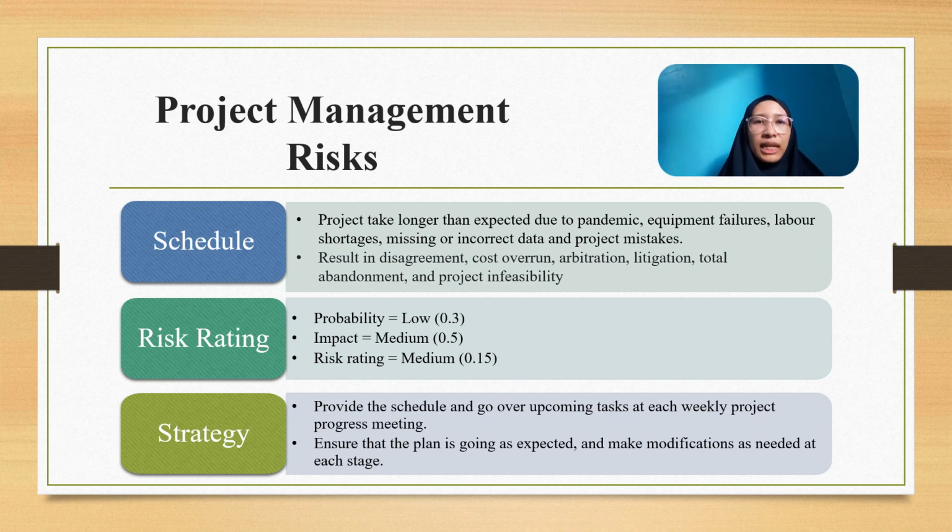The probability is low, impact is medium, and the risk rating is medium. By providing the schedule, going over upcoming tasks at each weekly project progress meeting, and ensuring the plan is going as expected and making modifications as needed at each stage, these risks can be minimized.